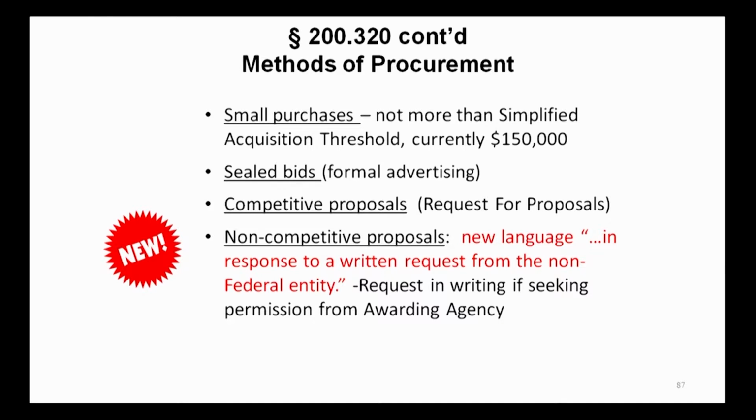Now, if you choose to go to your agency and ask their approval for a non-competitive proposal, you must do so in writing. So this is the new requirement in regard to non-competitive proposals.